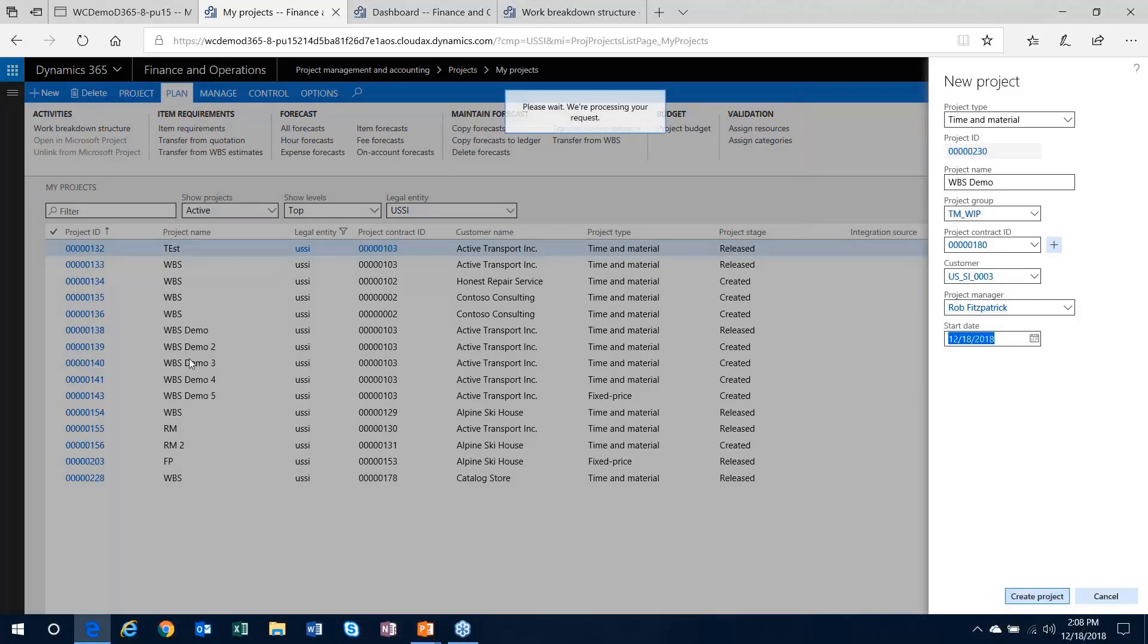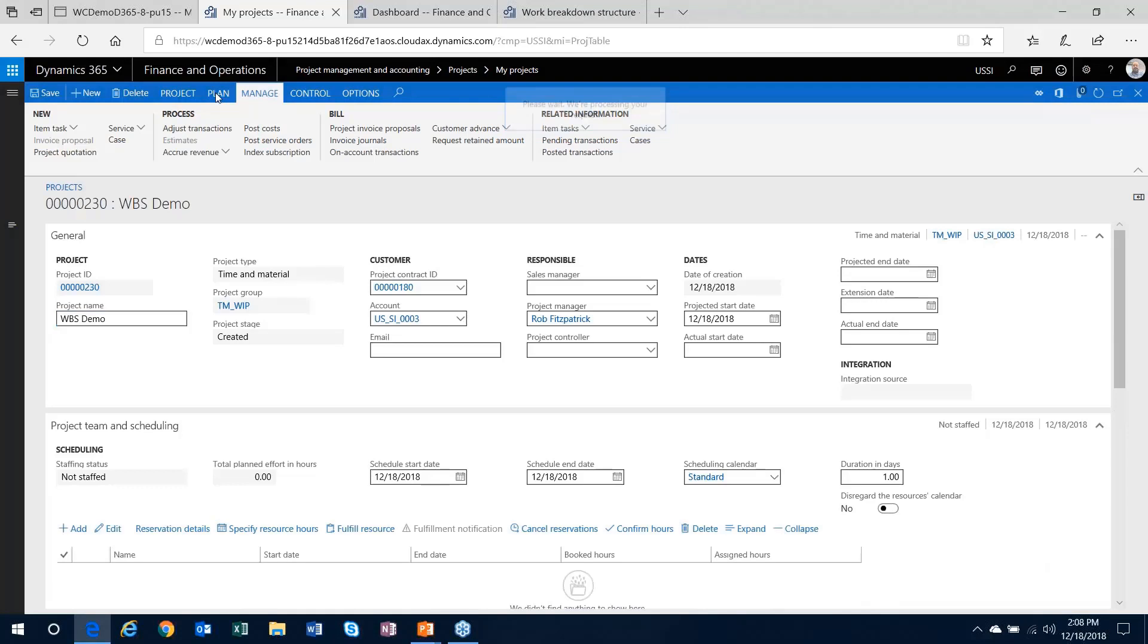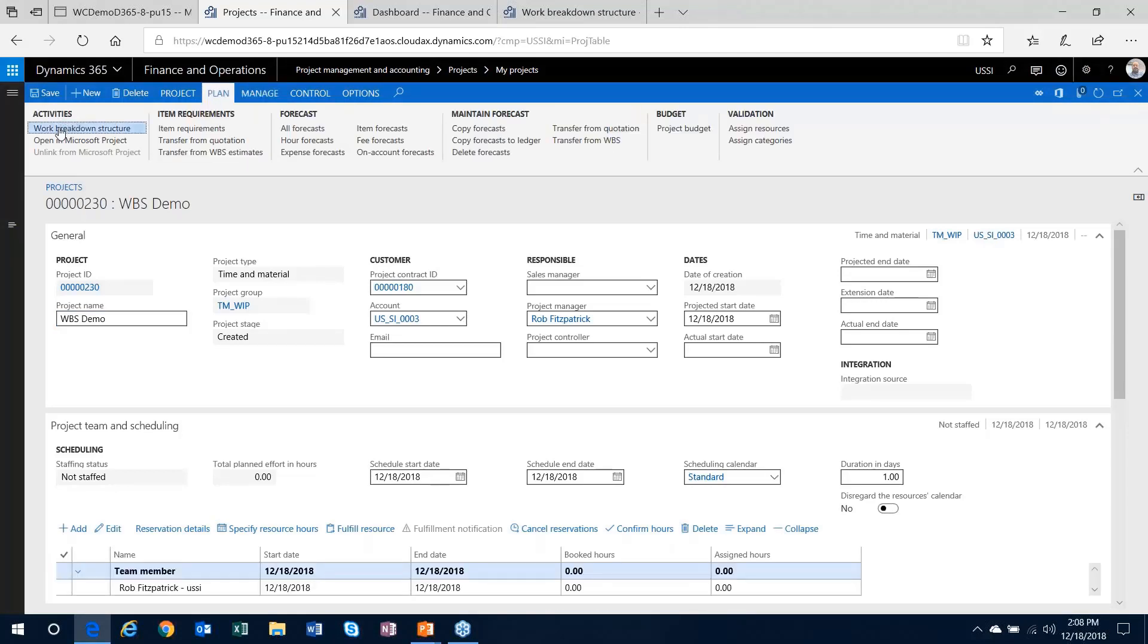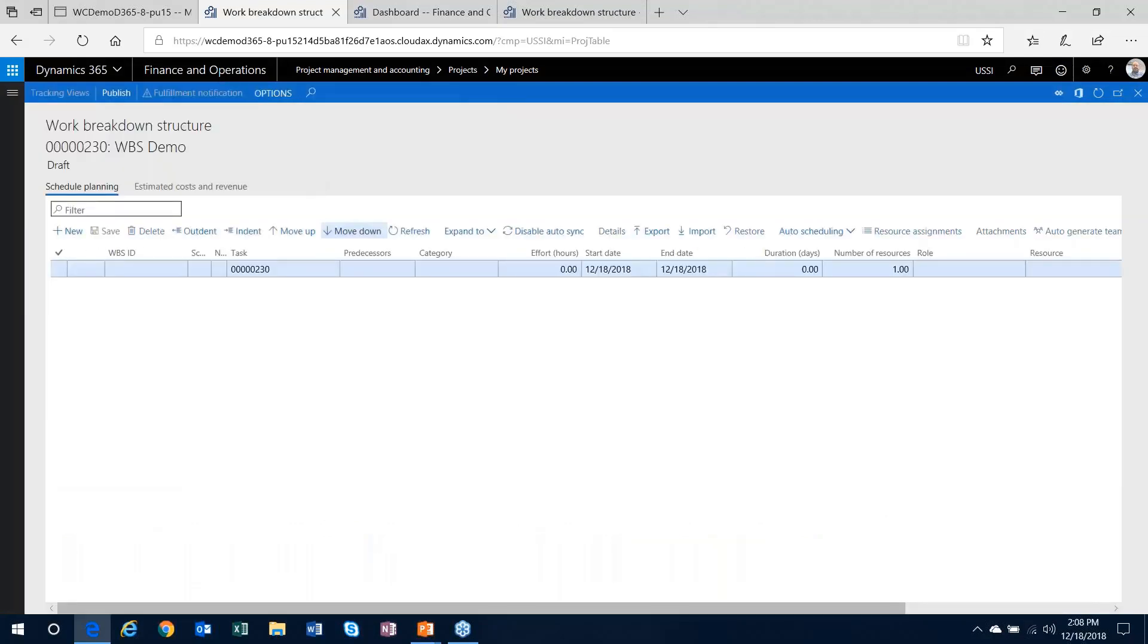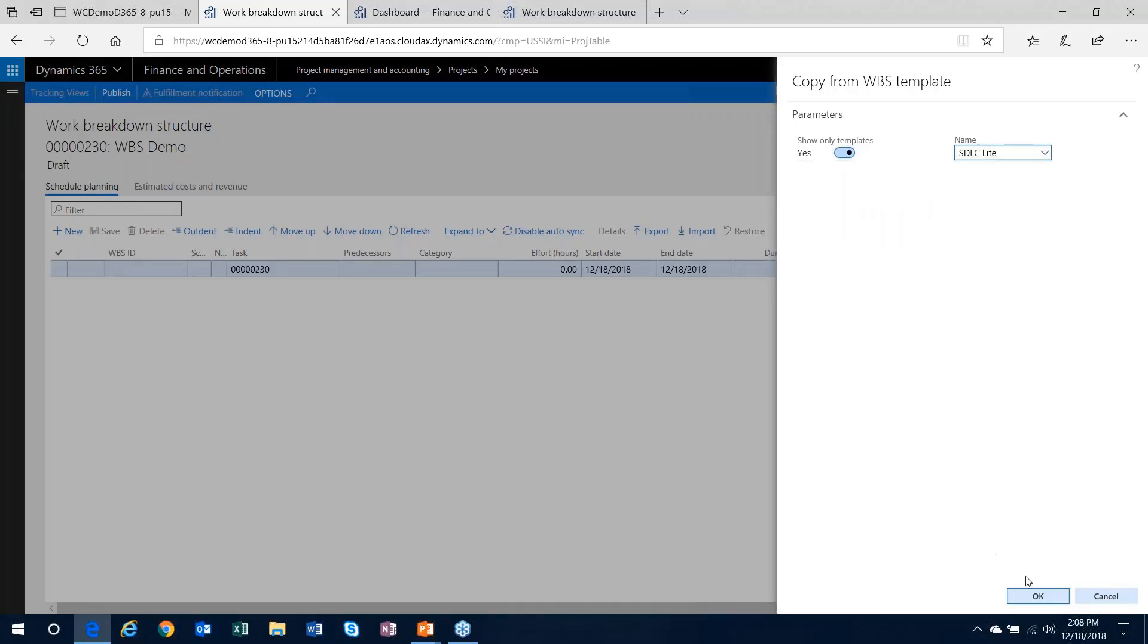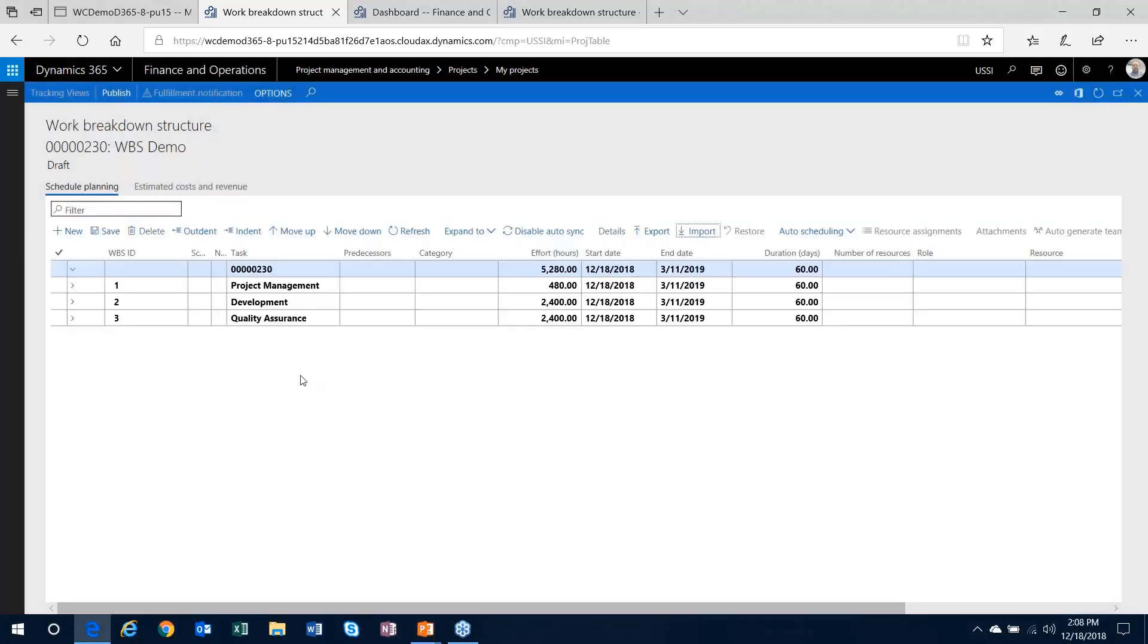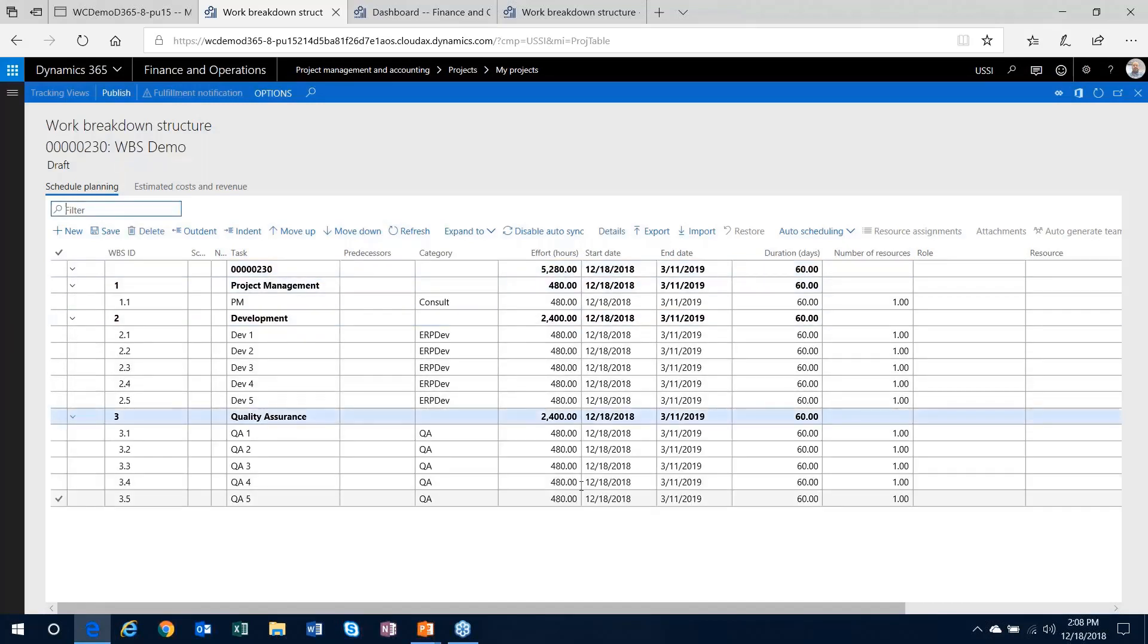I'll create my project. The work breakdown structure is stored out here under the plan tab. Under the activities area, you'll see the work breakdown structure button. That brings us directly out to the work breakdown structure form. You'll see the import export buttons here. I'm going to import something from one of the templates that's already existing. It'll show you any of the active templates. If you select the template and click OK, you will be able to import that work breakdown structure into the system, and it'll have all the subtasks that were built into the template already available.